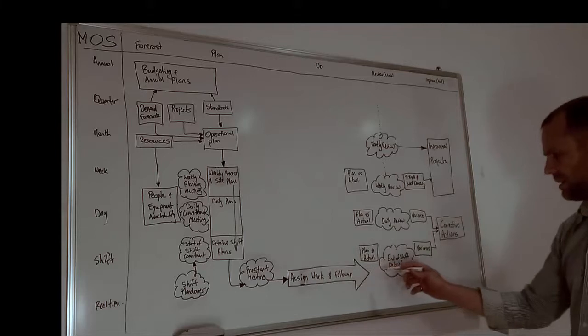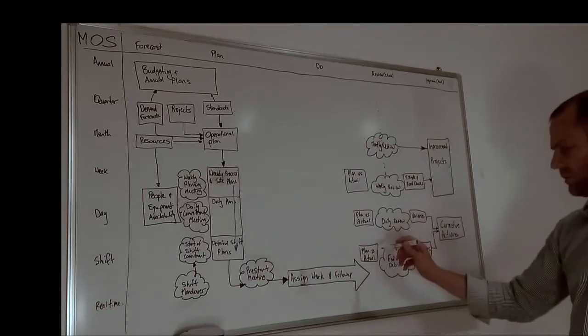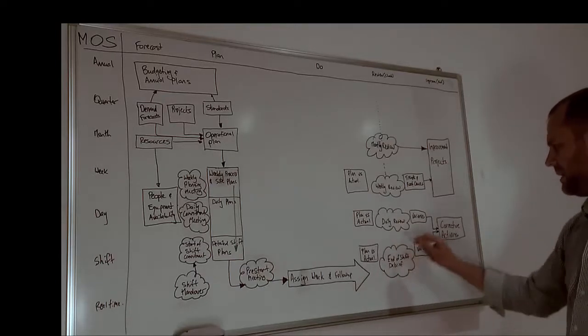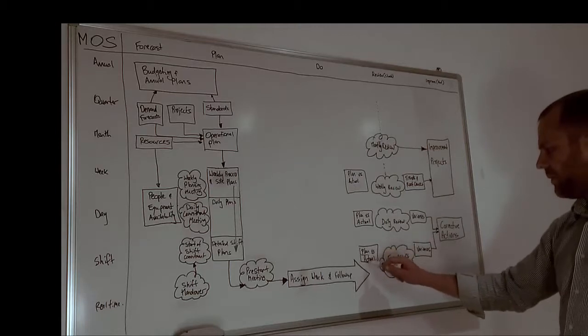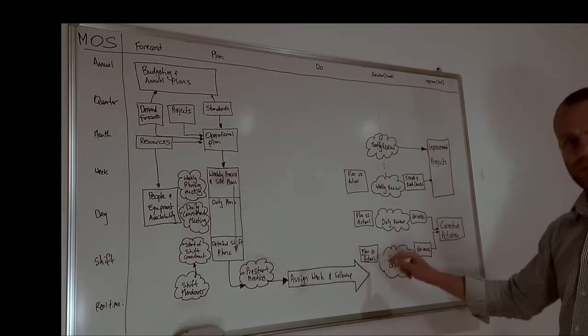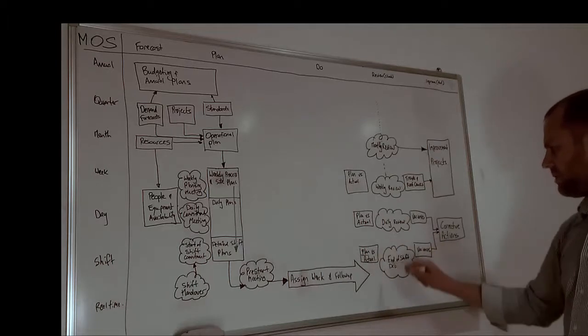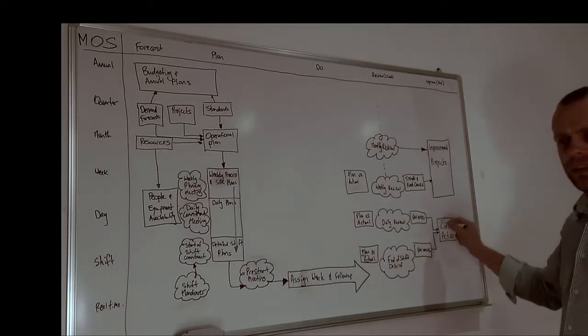Once we get to the end of the shift, a really valuable tool to be using here is this end of shift debrief meeting. So we get to the end of the shift, we talk about the plan, how we went against it, what the actual results were against the plan, and we debrief and talk about the variances from the plan and what we're going to do to fix those so that they don't happen again.